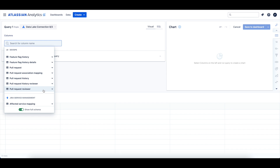Now that we've taken a look at the data within the DevOps tables, let's create an example chart with this data. In this example, let's calculate the cycle time of our successful deployments to our production environment. Cycle time refers to the total time from starting to work on an issue until the work was completed.